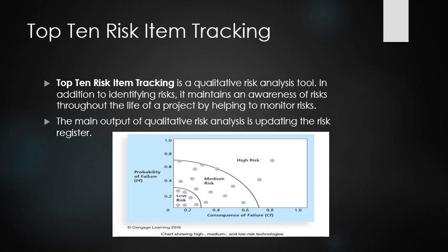The review begins with a summary of the status of the top 10 sources of risk on the project. The summary includes each item's current ranking, previous ranking, number of times it appeared on the list over a period of time, and a summary of progress made in resolving the risk since its previous review.